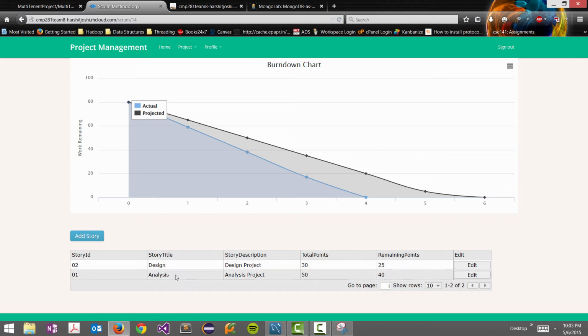our analysis task. And so overall the work done for this project is 15 hours, and today is the sixth day and we are still in the first week of our project development. So based on this pace, the whole project will be finished in 6 weeks. And you can easily see the burndown chart on it.